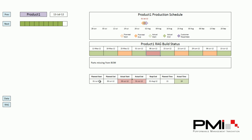Down the bottom we've got the planned start, end, actual start, end, required end, the planned time, and the actual time. With this particular product it was completed in 19 days. The actual start and actual end are highlighted red because we were a few days late — we should have started on the 1st but actually started on the 5th. We should have ended on the 30th but ended on the 31st, even though we've got green for actual time because it was produced quicker than planned.